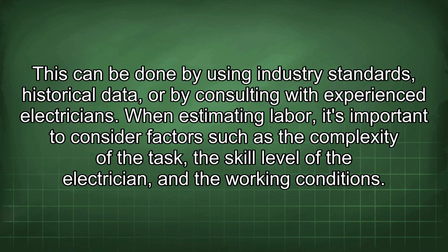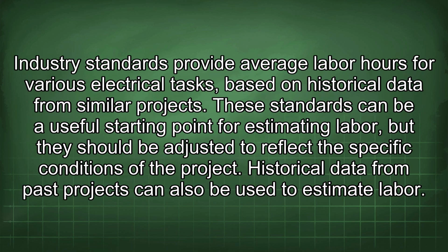When estimating labor, it's important to consider factors such as the complexity of the task, the skill level of the electrician, and the working conditions. Industry standards provide average labor hours for various electrical tasks based on historical data from similar projects. These standards can be a useful starting point for estimating labor, but they should be adjusted to reflect the specific conditions of the project. Historical data from past projects can also be used to estimate labor.